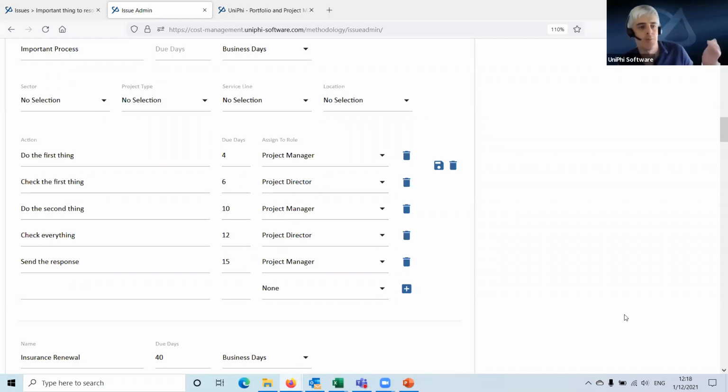They can say, for the concept design reviews, we did 40 of them last month, we did 35 of them on time, 5 of them were late, and we were given 10 that we were unable to respond to because we went back saying that they were incomplete, and you haven't responded back. So they're still open. So, it can be used to do those sorts of processes.